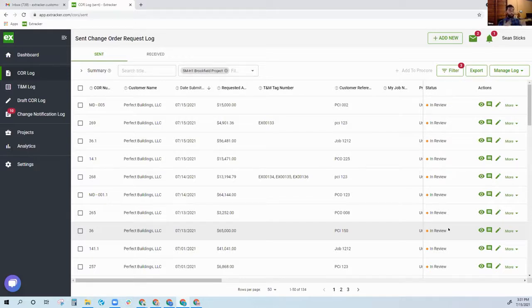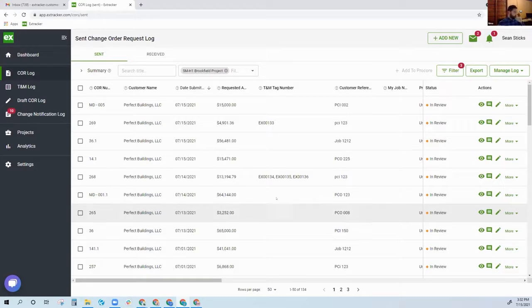So your responsibility as a project manager, a company owner, is to follow up on that change order. And what that means is calling your general contractor, emailing them. And again, what that means is maybe calling them and not getting them on the phone, leaving a couple voicemails, catching them at a bad time. Or if it's with email, you're emailing and you're not hearing back for 3 days. So these are all delays when it comes to change orders.